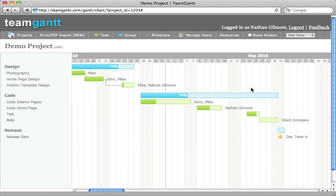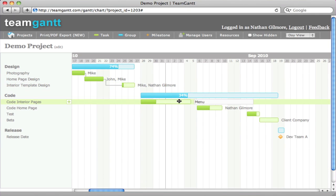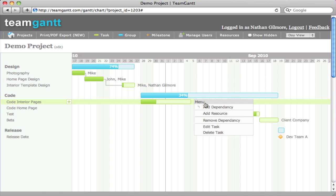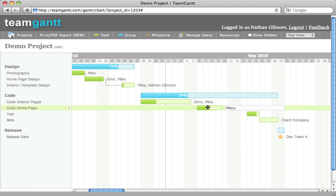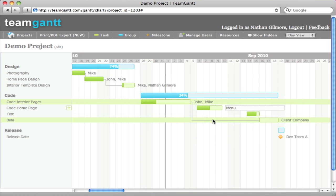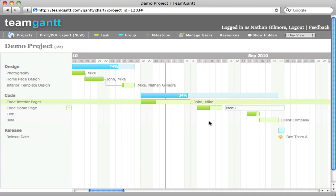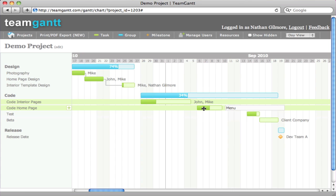To add a dependency in TeamGAMP, simply hover over a task, click Menu, click Add Dependency, and then you can hover over the next task or milestone that you would like to link the previous task to.